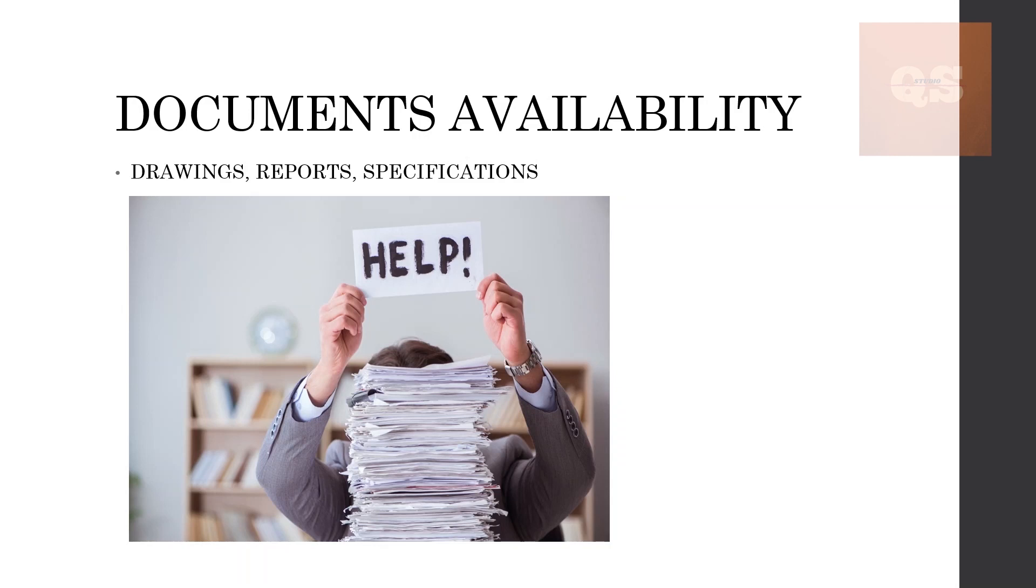Most importantly, the specification—this is a very important document required without which it will be difficult for preparing the BOQ. You need to know which type of material is used for the different items: the pipe materials, the cable material, the cement type, the door material, the flooring material. All these types of materials need to be known so that they can be included in your BOQ. Without knowing which type of material, it is going to be difficult for the pricing purpose.